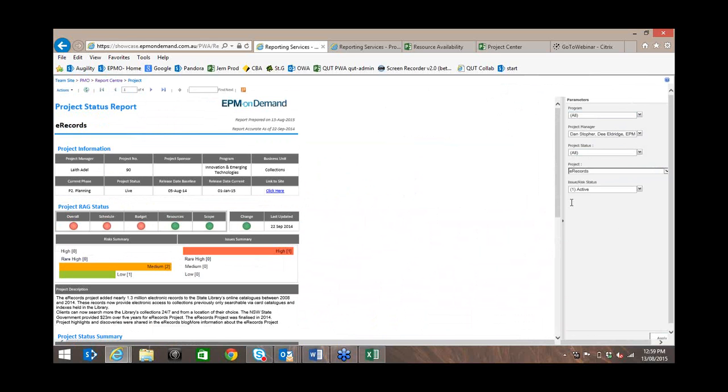However, so that's a whole lot of positives and great functions that SSRS provides. However, what we can't do here is make many modifications easily. For example, if a user just wanted to remove a column or add an extra column, anything like that would require a report writer to go into the tool itself and update the design of the report. So there's no modification to the output through an average user's interaction with the tool, which was a little bit different to, say, the views, which were very flexible and a user could filter them and group them and so on.